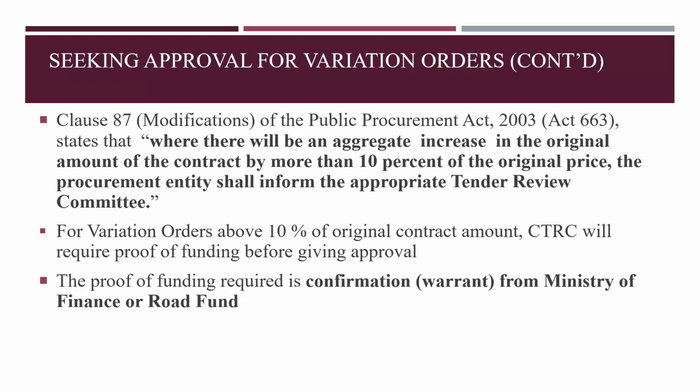So you see that a lot of the time our fight is with Central Tender Review Committee on this issue, because we think it's a variation order on an ongoing project which already has a warrant, but we don't think that we need warrants to continue with this process. So it becomes a tussle between us and Central Tender Board, and sometimes it becomes very heated because there's pressure on us to get the works through. The proof of funding they will often require is a confirmation in terms of warrant from the Ministry of Finance, or if the project is funded by RUFAM, they will be looking for confirmation from RUFAM.